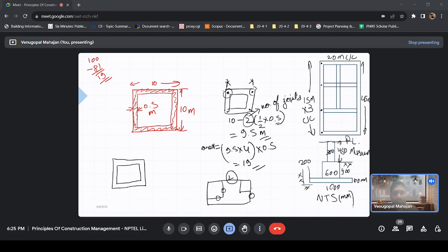So what we would do is, if we fix that this axis is the long wall, then perpendicular to it, we will say it is the short wall. So even if this wall is lesser in dimension than this wall, this one will become a long wall and this one will become a short wall. Agreed? Do you guys concur with the convention? Yes. Okay. So why I'm telling you this is because when we go back to our original question, we will need this convention.